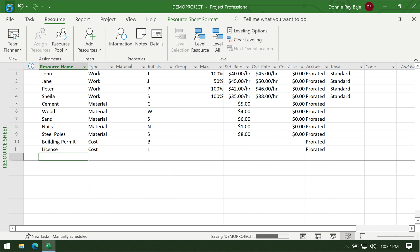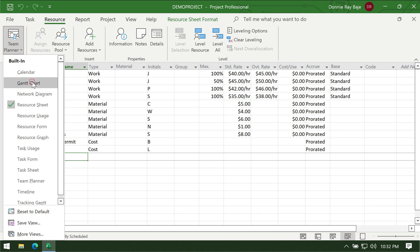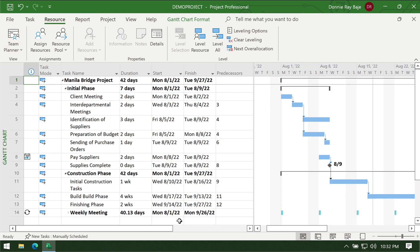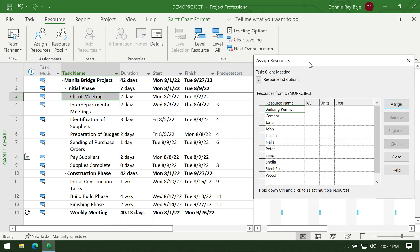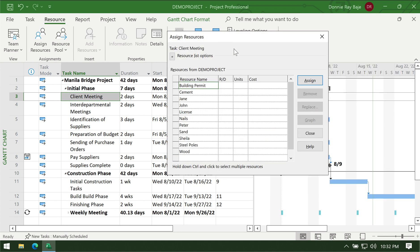Let's save this. Now we have our resource sheet completed. We're now going to assign resources to the project itself, so we have to go back to the Gantt chart. There are actually several ways to assign resources to a task. For example, for the client meeting task, you can right-click on it and you should see 'Assign Resources' in the menu.